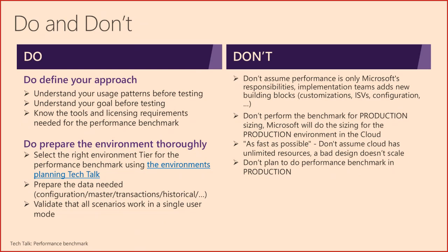And continuing on the environment, you need to make sure that you're going to select the right tier that will have sufficient power to cover the transactions mix and the number of users, simulated users. Also, as you have your scenarios, define really what would be the minimum data needed in the system, whether it's configuration, master, transactions, historical, to plan time for that.